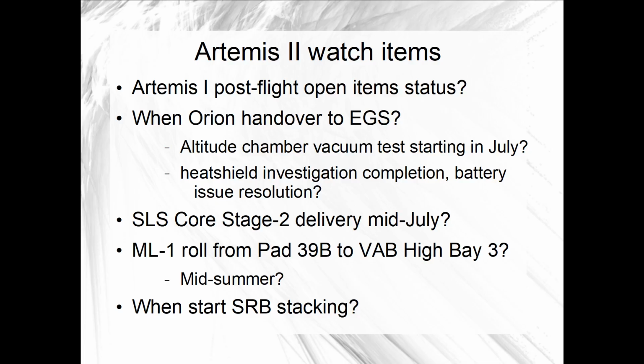We are waiting for the outcome of the independent review of the internal NASA heat shield investigation effort, along with updates on the status of the 2 issues that were disclosed in January and also contributed to the decision to delay Artemis II until the last quarter of 2025. We're also waiting for an update on the resolution and corrective actions for the issue with an electrical circuit in some digital motor controllers and an issue with the spacecraft batteries.